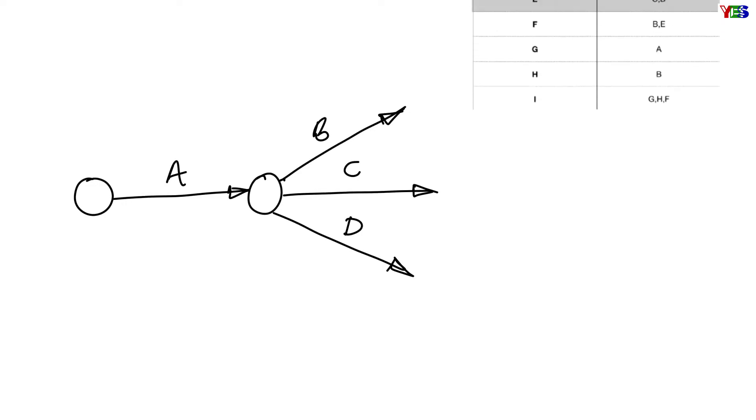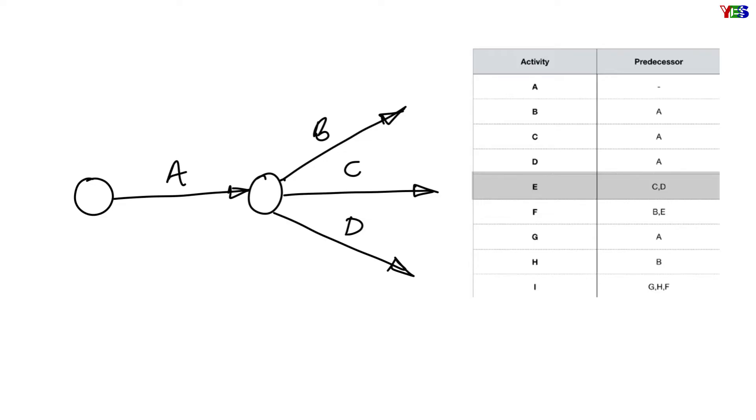In the next row we have C and D as predecessors of activity E. That means after completion of C and D simultaneously, activity E will start. That means C and D should have same head event, but it's not possible as per the rule because they're already having same tail event. So we need dummy activity here.